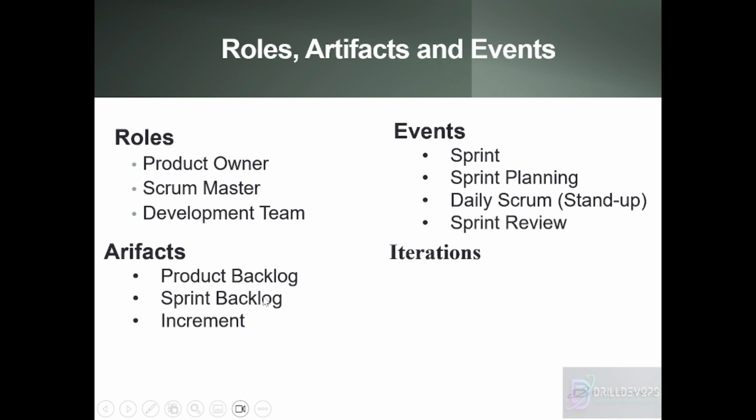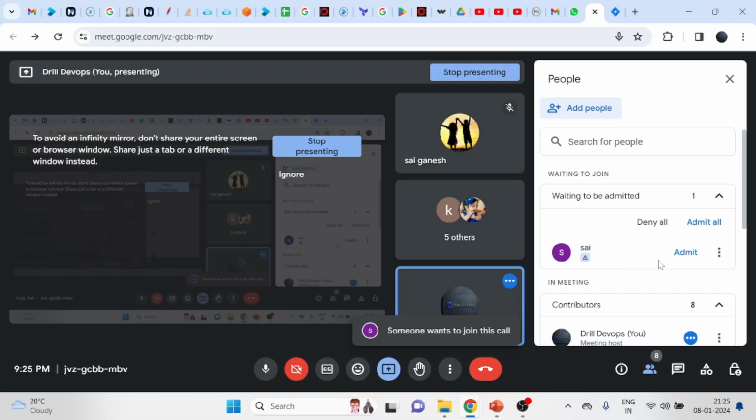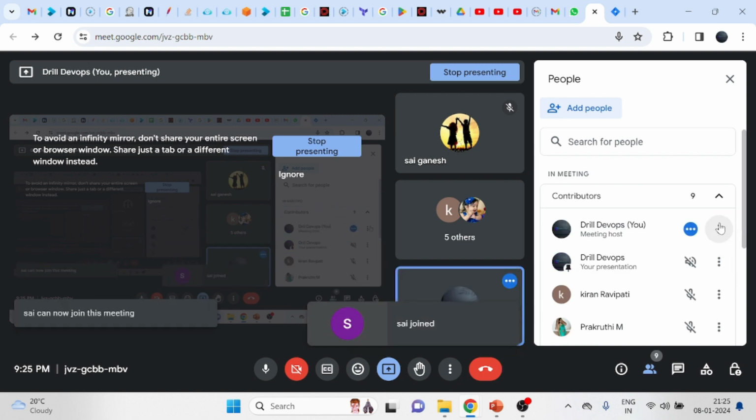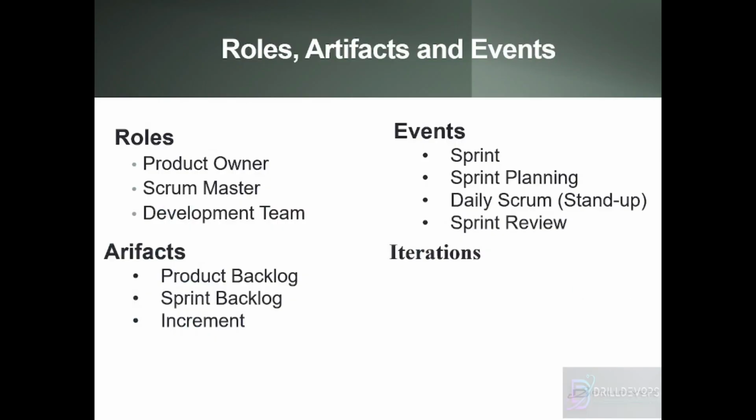During the sprint planning, we will pick items from the product backlog, like I said, pulling some tasks from the backlog items. That backlog is nothing but the product backlog. The product owner will list all his backlog items there. During the sprint planning, we will pick those items on a priority basis, and we will work and try to deliver them in the same sprint.